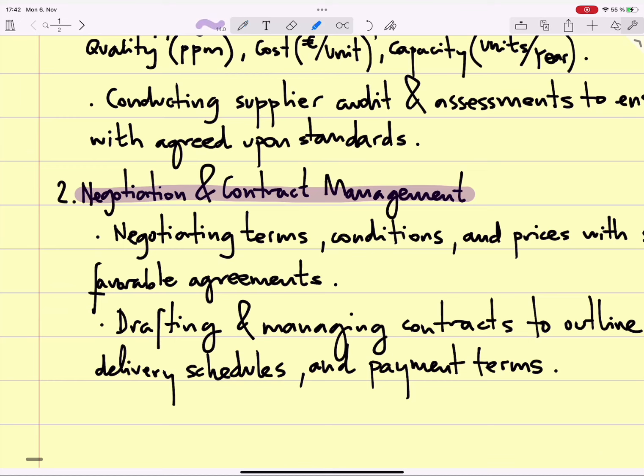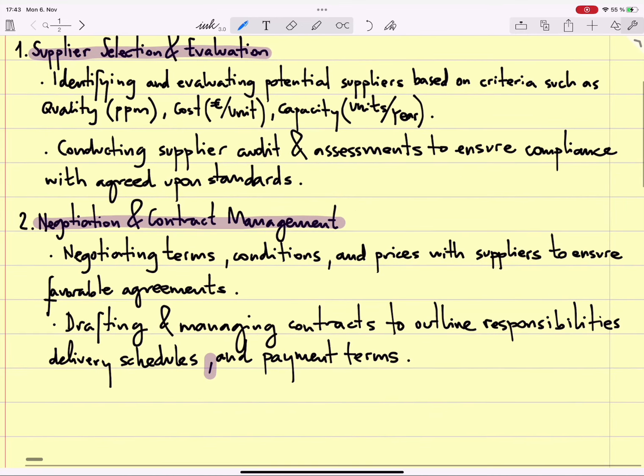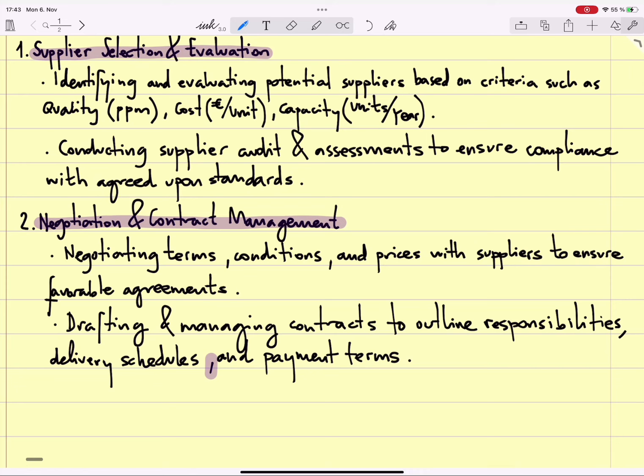This comma, I don't know if I said it before, this comma is important. This is called Oxford comma. It means that the enumeration is not closed. If I wouldn't put this comma, this would mean that the enumeration is closed, and this is relevant for certain contracts, okay?